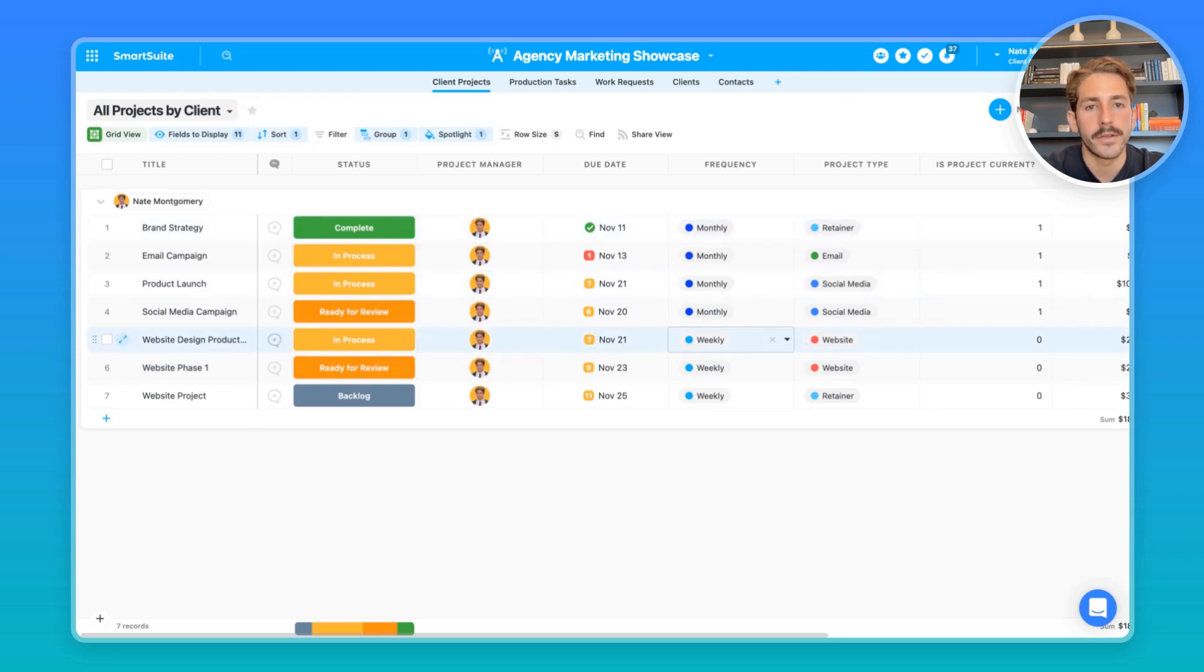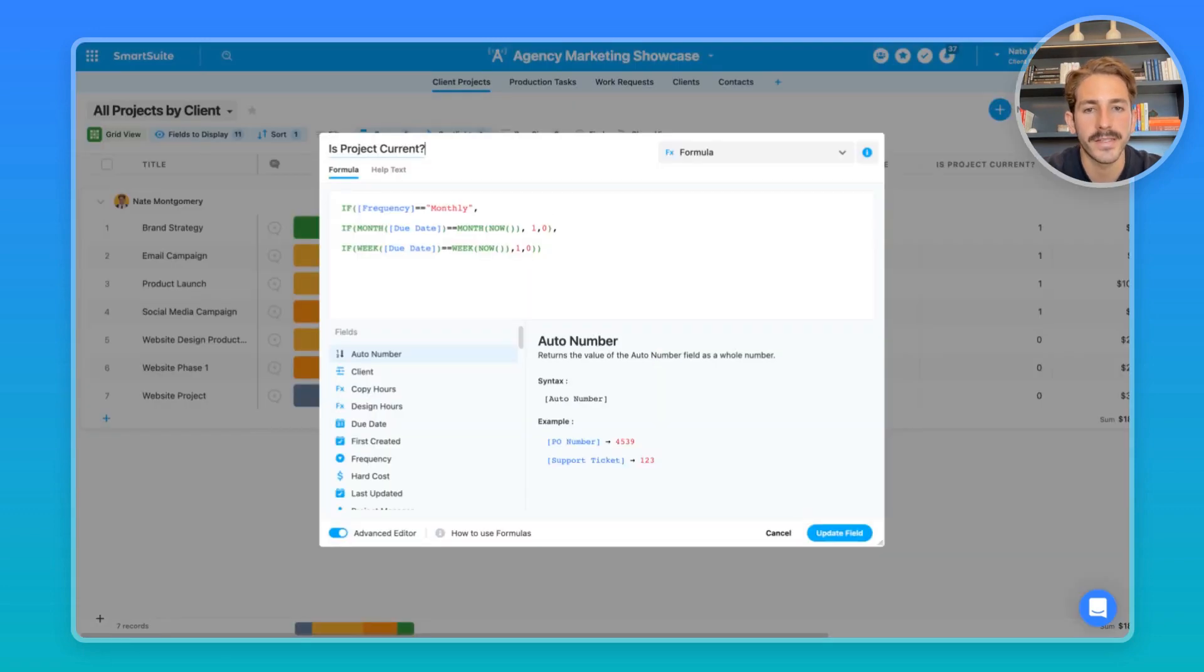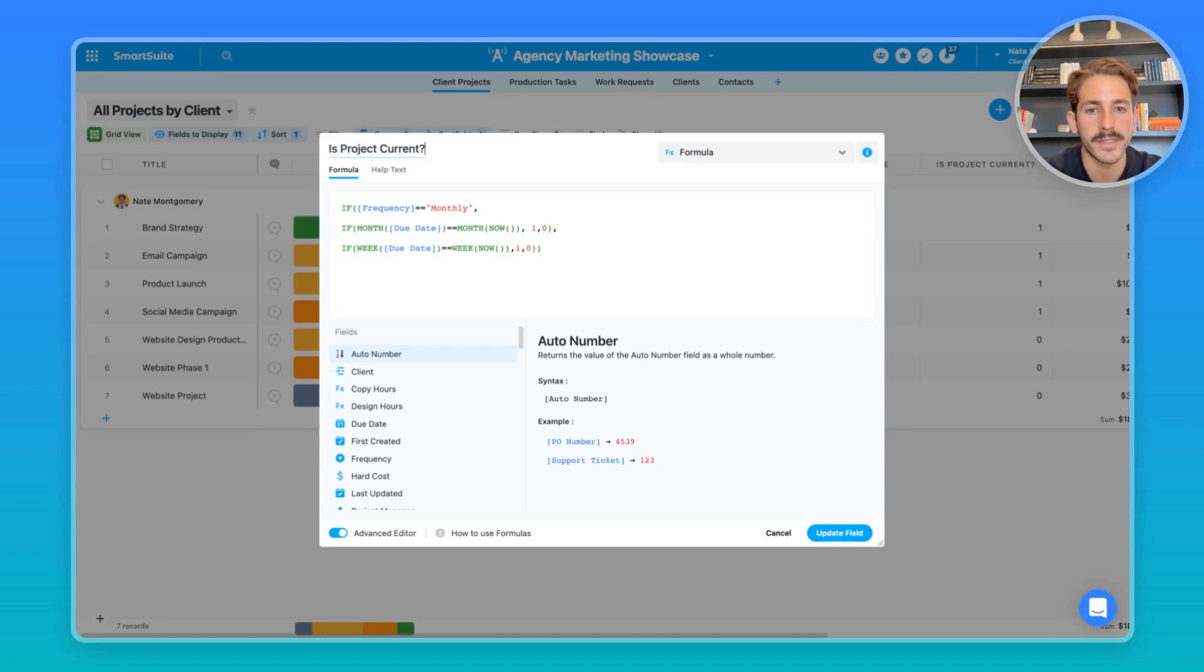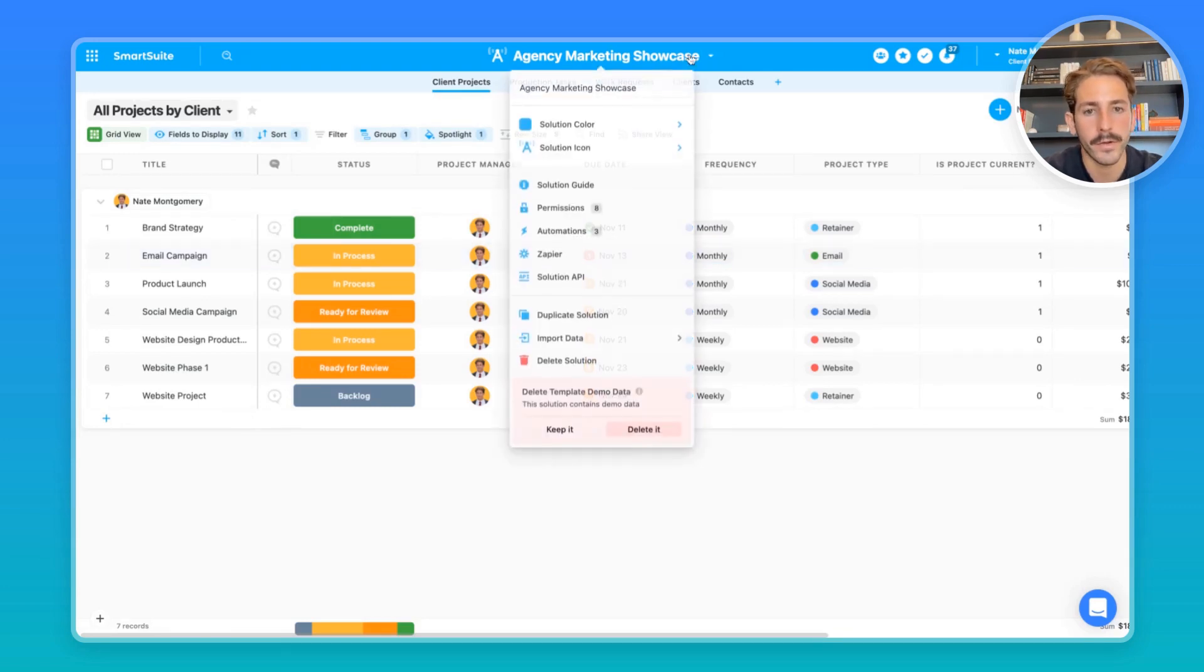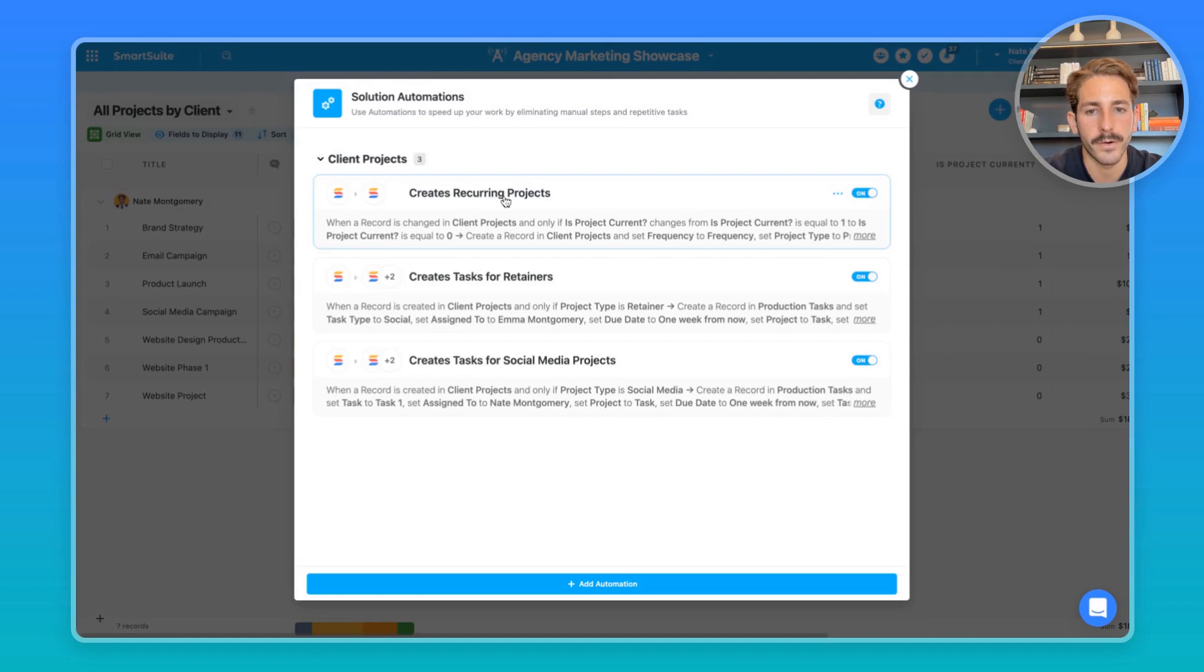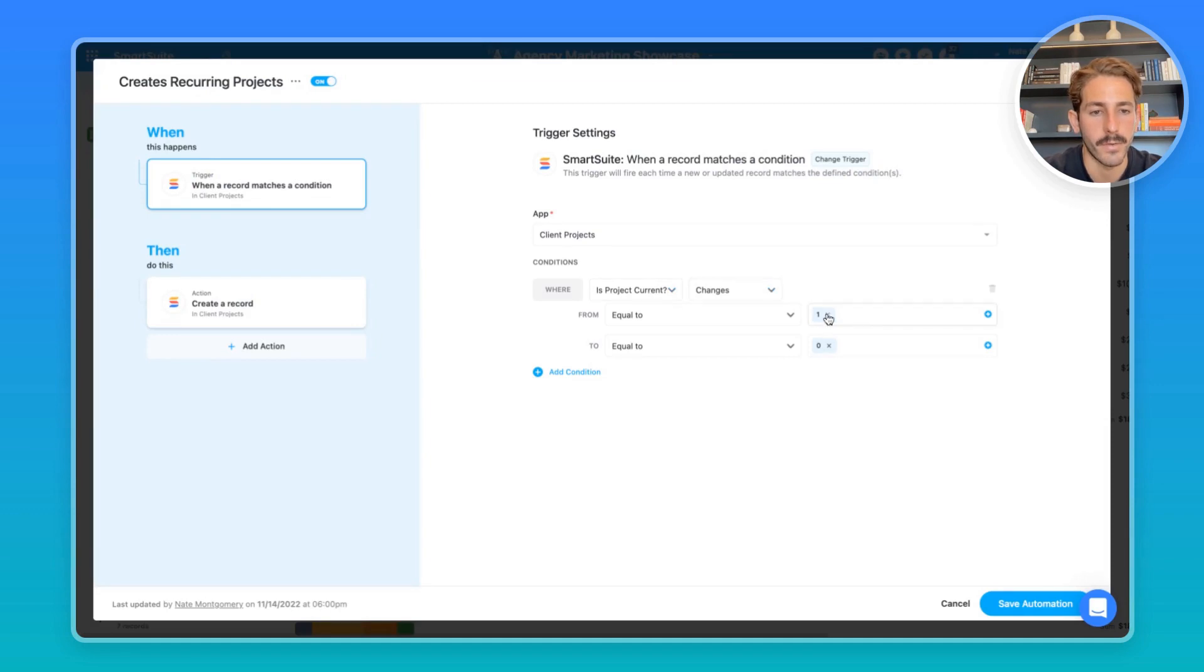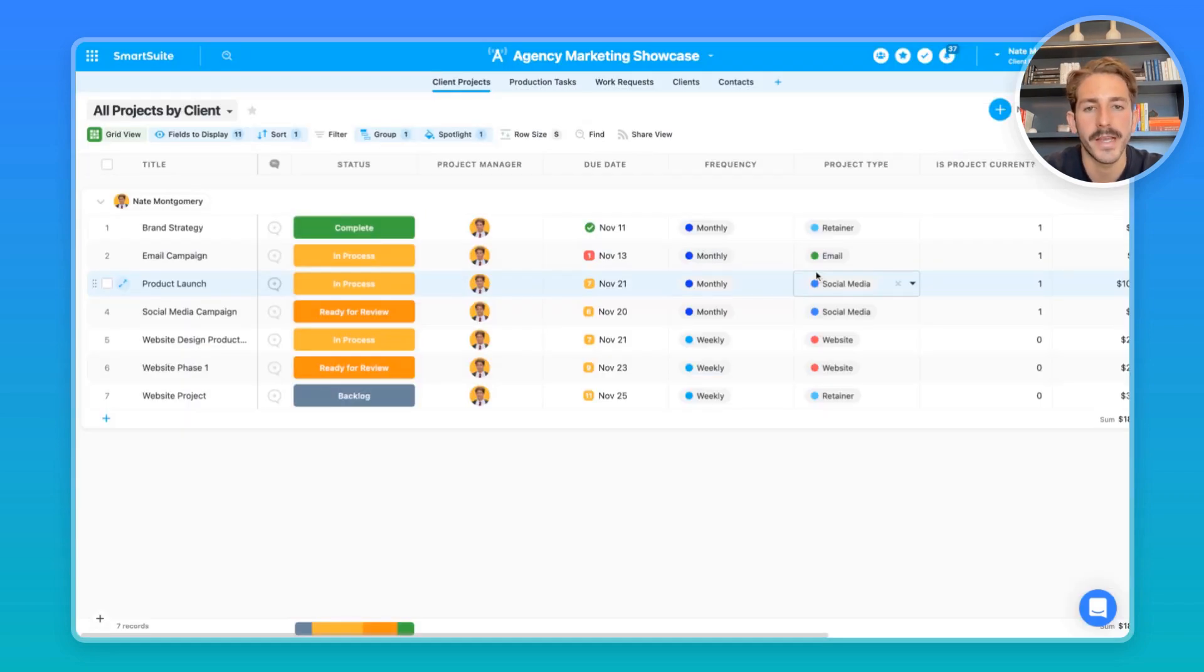So the trigger for this recurring project lies inside of this formula field here, and it's called 'is project current.' You can see there's ones and zeros right here. To summarize this, this means if you have a project in the month of January, at the start of February it's going to move from one to zero because the month of due date is no longer matching the month of now, which means this formula field is going to change from one to zero, and that's exactly what we're going to use for this trigger here. Moving over to the automations, creates recurring projects automation right here. When a record matches the condition where that formula field changes from one to zero, you're going to create a project, and it's going to pull information from that previous project and put it into the new project. This is a great way to schedule recurring projects and even recurring tasks.